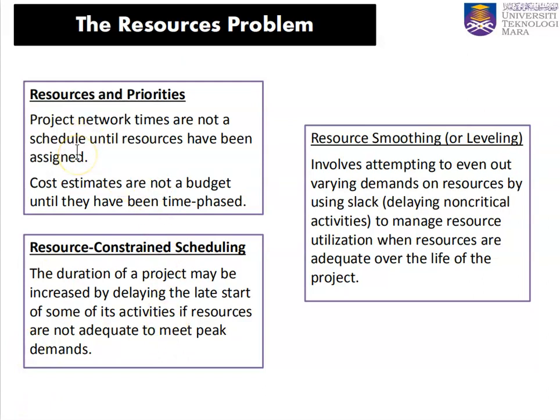The project network times are not a schedule until resources have been assigned. The estimated cost is not a budget until it has been time phased, which means proper planning.